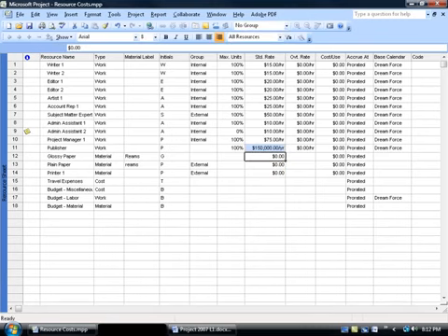Now Project will keep track of this. So let's go back to our $5,000 a week example. Project will calculate this out, so it's not going to give him $150,000 if he's only worked 2 days. It'll actually take all the days within the year and assign the days so many dollars a day based upon your yearly rate. So let's do something easy. Let's say they got $5,000 a week. That's $1,000 a day. If they've only worked 3 days, then Project will calculate $3,000.